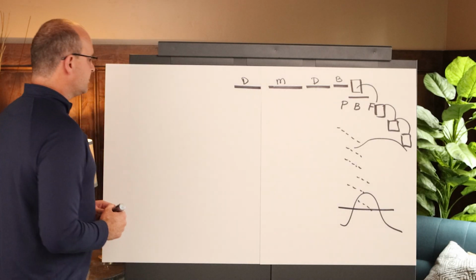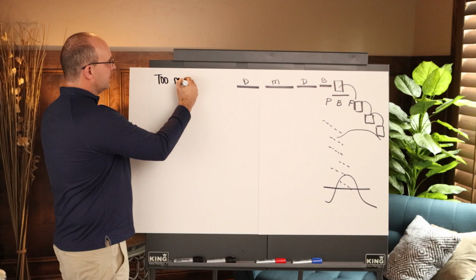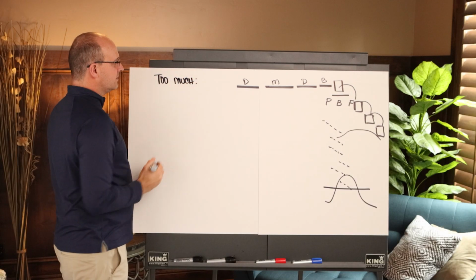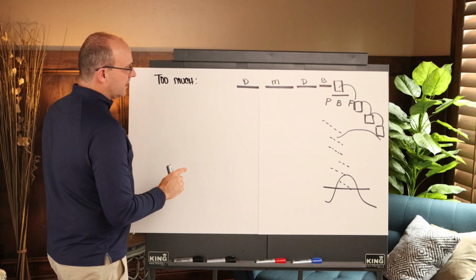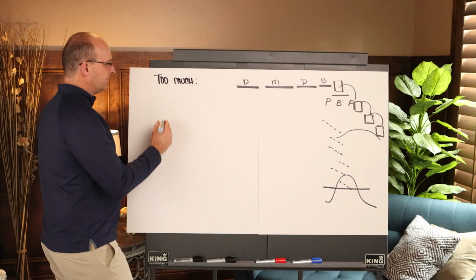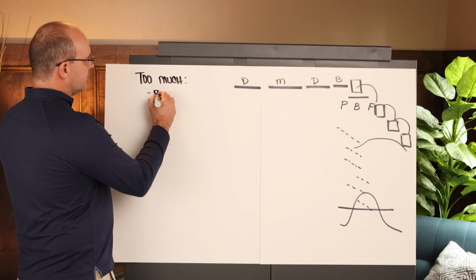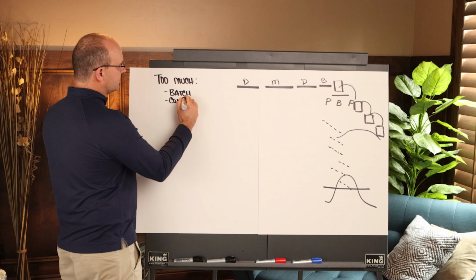When you bring out too much of something, you have consequences. Now, I'm going to go fast. The first part I do cover in other videos. But when you bring out too many people to try and do this in a CPM schedule, you then start to batch. When you start to batch, then you have context switching.